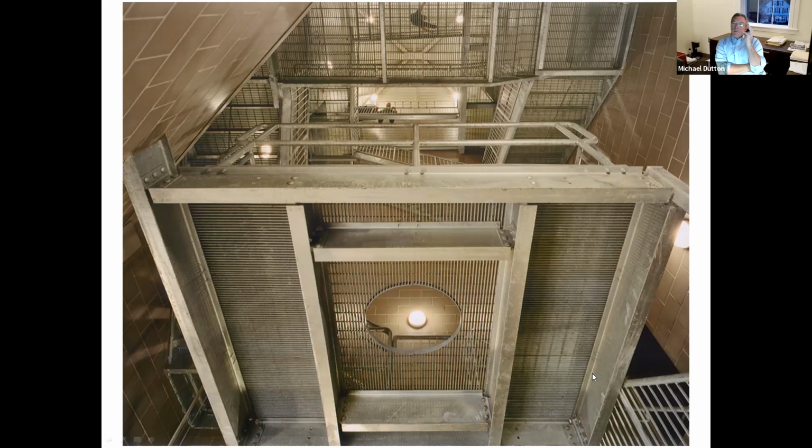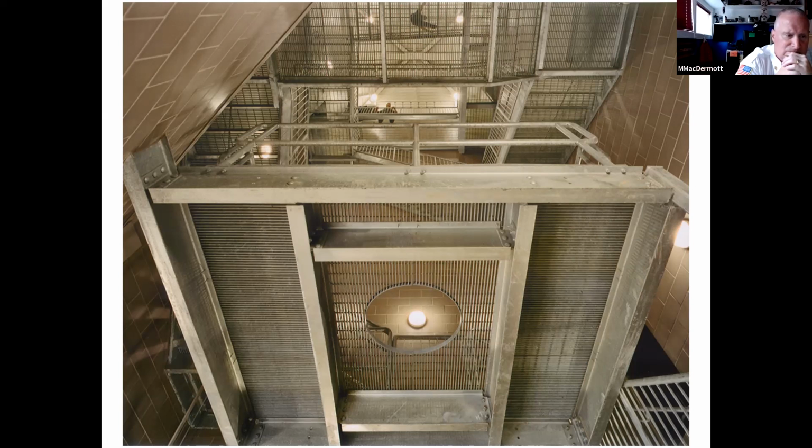So it's a capital expense, but if you really look at the life expectancy of the station, and you look at the operational savings from not having to travel to do that kind of training, those are the kinds of trade-offs that you have to think about. It doesn't take very long to add up the overtime and the straight time and training budgets over the course of 30 years, and then translate that into what the savings would be from just expending a little more capital when you're building the thing. Generally you do that kind of analysis, and it makes more sense.